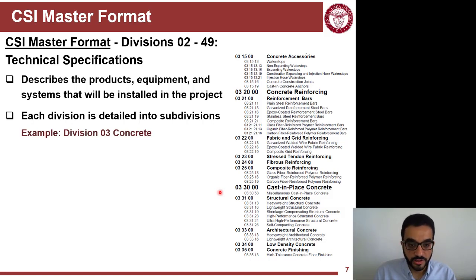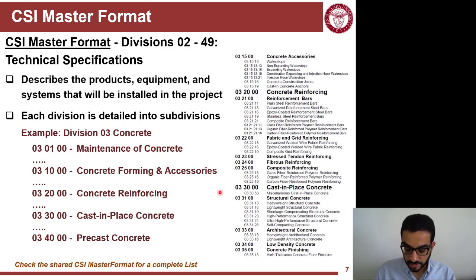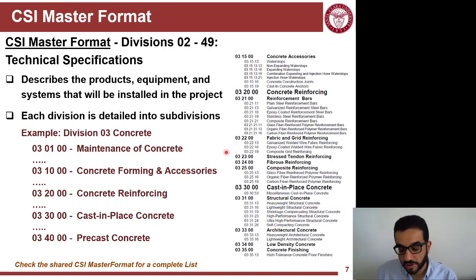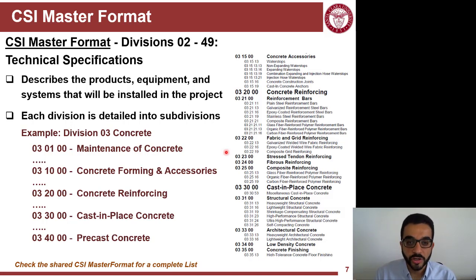Division 3 as a whole covers everything about concrete. I will post on the course website a sample of the CSI Master Format. It's many pages, but it serves as a template to organize specifications for a generic construction project. It doesn't give you the actual text within each division and subdivision, but it tells you how people expect you to organize your specifications.